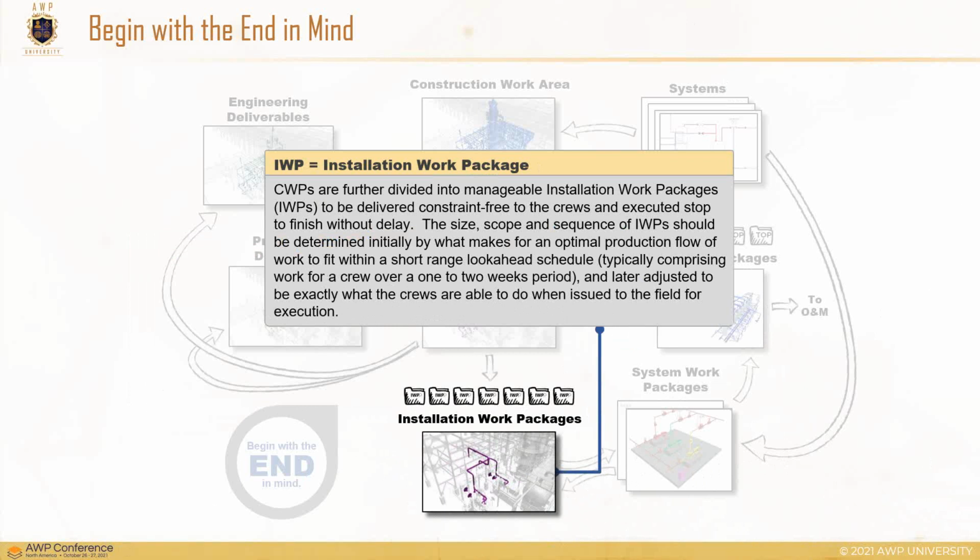One example I'd like to give is if you're in an underground program, and you're installing risers from an underground header for drains, you're only going to get opportunities to install the risers and tie the risers to the headers in certain intervals. Usually you're going to tie that program to a foundation program, and you're going to come up from the header with the riser when the foundation is being dug and the forms are in place and being worked on.